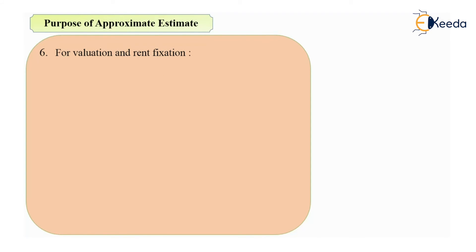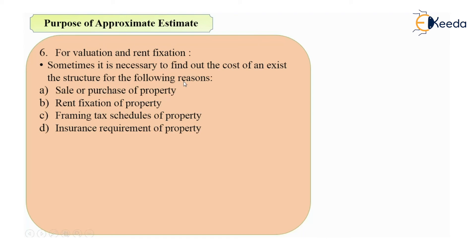Approximate estimate is also used for valuation and rent fixation. To value a building, you check two things: the cost of the plot or land in that locality per square foot or per meter square, and the cost of construction on that day in that locality. From those figures you can value your building — that is nothing but valuation. It is also very necessary to find out the cost of an existing structure for purposes such as sale or purchase of property, rent fixation, taxation, or insurance.